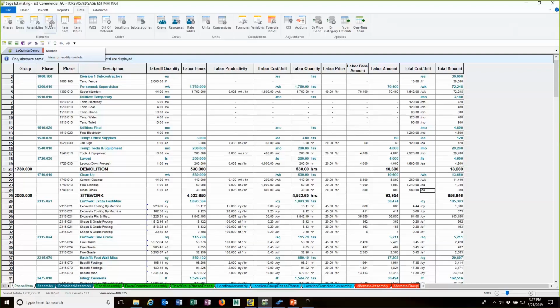Really powerful, and very powerful for people doing pre-construction or even pre-design kinds of estimates. We've got WBS codes that we can assign, bill of materials and locations. We can build crews, so if you want to estimate your labor using a crew rather than a composite labor rate, you can do that. Formulas here calculate quantities and things like that.